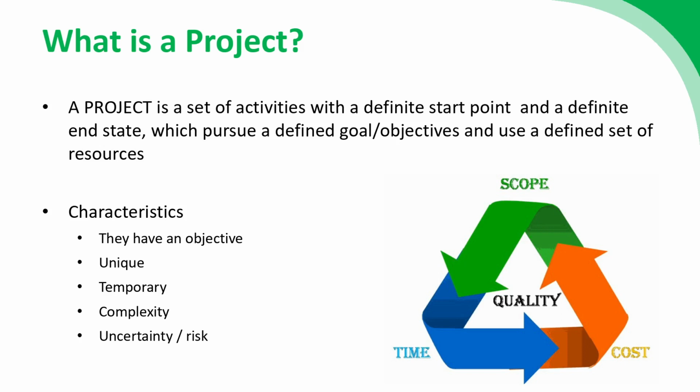As well as a start point and an end point, we can identify specific defined goals or objectives, and those are also a hallmark of a project. Projects have specific objectives which they are attempting to meet. So to build a library to a particular specification, to a particular standard or a particular quality level, that's a particular objective. To build it within, say, 6 months or 7 months, again, that's a defined time objective. So projects, as well as having start points and end points, will also have specific objectives or goals that they are trying to meet.